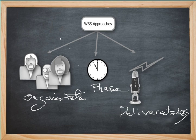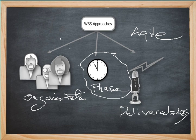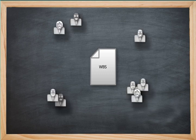According to Rita Mulcahy's PM Crash Course book, she prefers building WBS by phase and not by organization or deliverables. Her reasoning is that understanding one work package's dependency on other work packages works best. This also fits with Agile, where work packages can be grouped together into short development cycles called sprints.